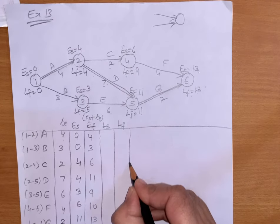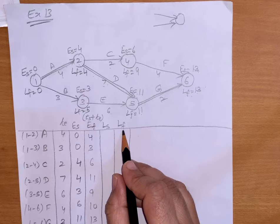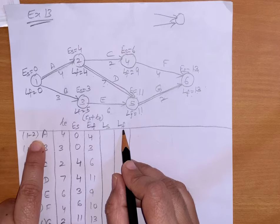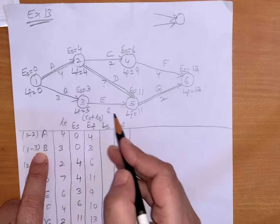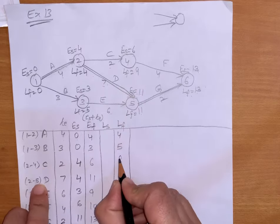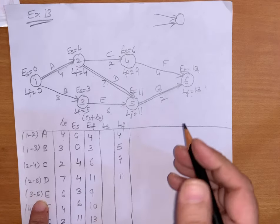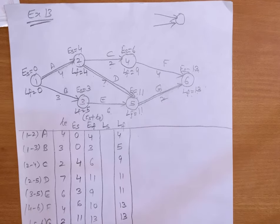Now, how to record in the PERT table: latest finish is recorded for the end event. For activity ending at event 2, latest finish was 4. For event 3, latest finish was 5. For event 4, latest finish is 9. For event 5, latest finish is 11, and again 11. For event 6, latest finish is 13, and again 13.